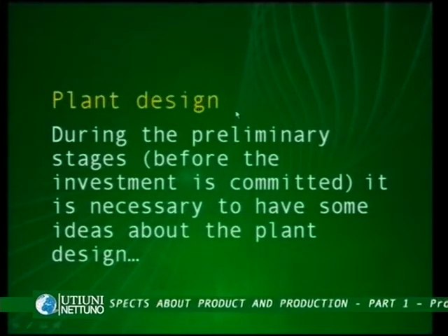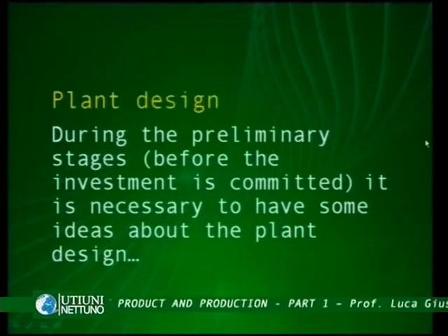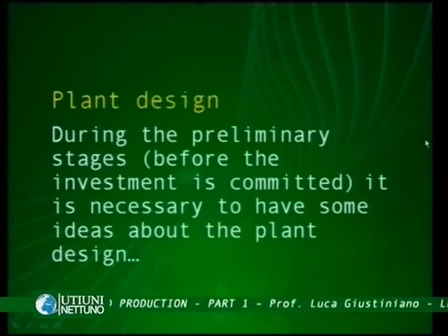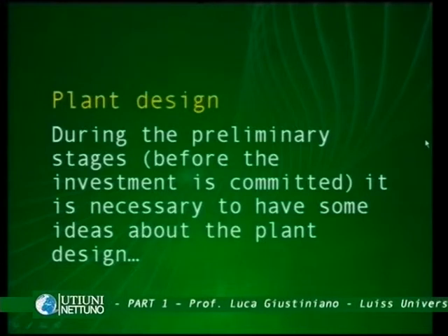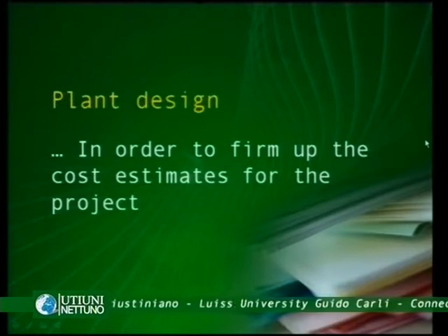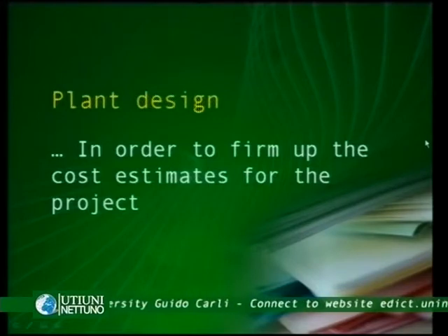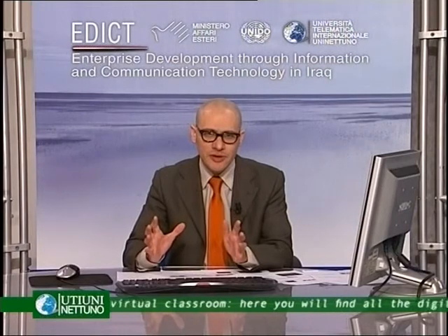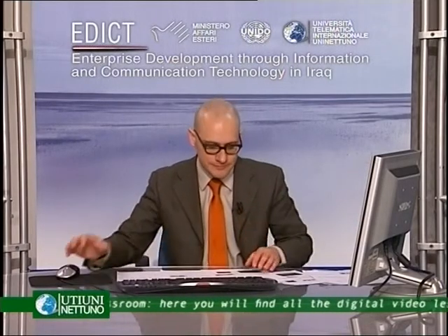Plant design, during the preliminary stages, before the investment is committed, it is necessary to have some ideas about the plant design in order to firm up the cost estimates for the project. So, as we've seen, we have the preliminary phases and then we have the feasibility analysis phases. During the preliminary phases, although the plant is just an idea, it's just a project, it's very important to define its characteristics in order to estimate costs.